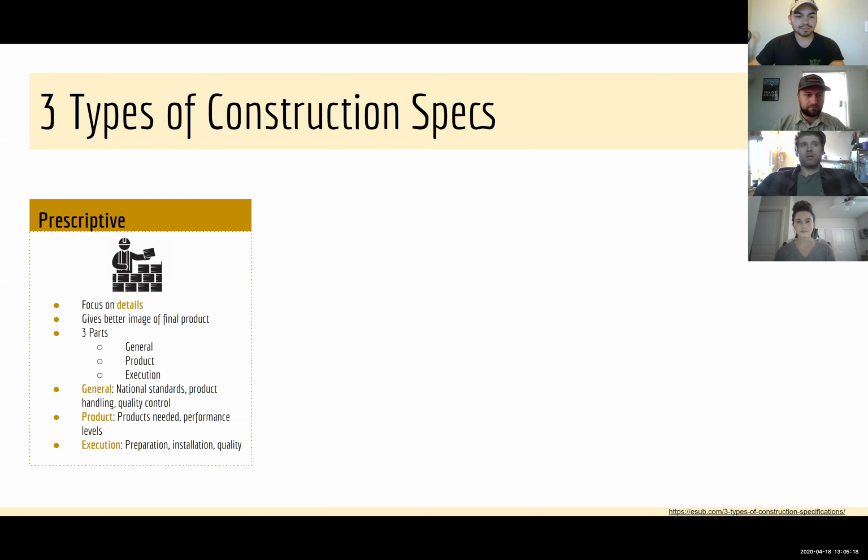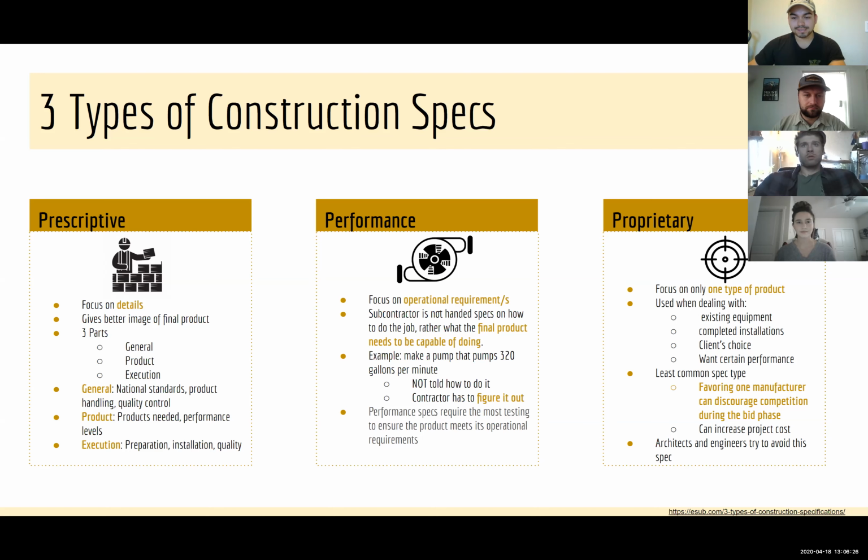The last spec is proprietary. This one focuses on only one type of product. It is used when dealing with existing equipment so that it can match what is already there, completed installations, if it's the client's choice, or if you want a certain type of performance.